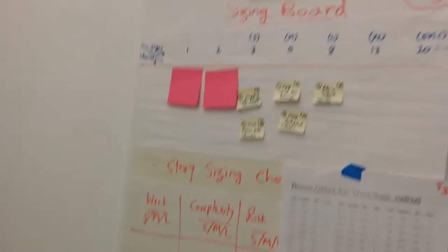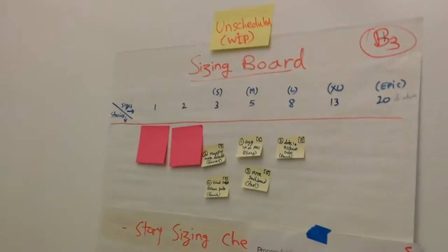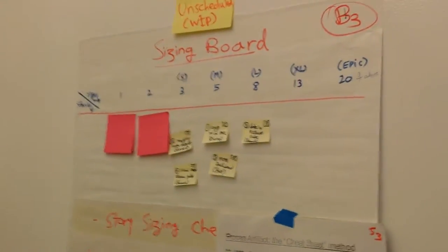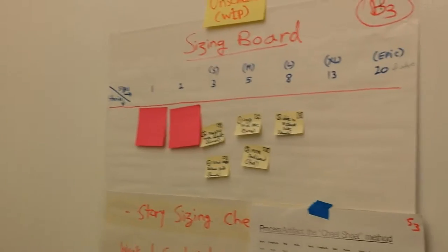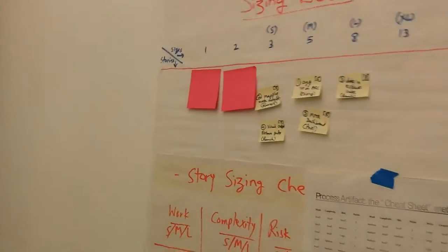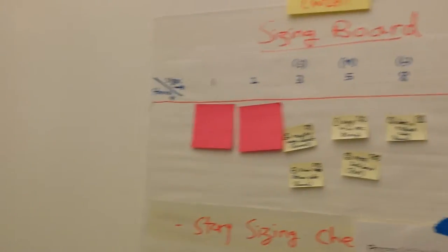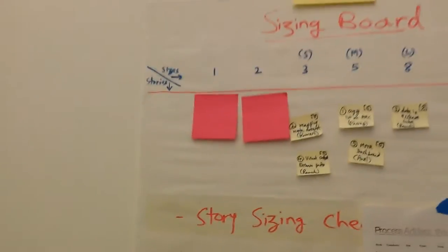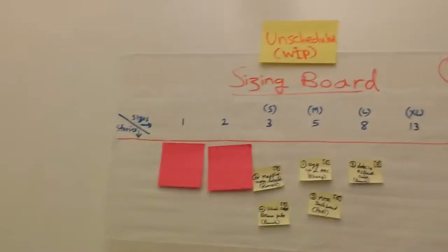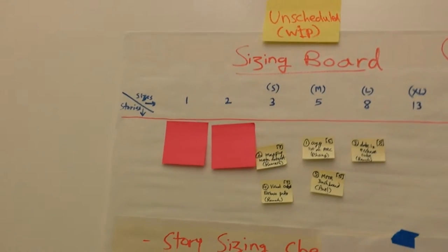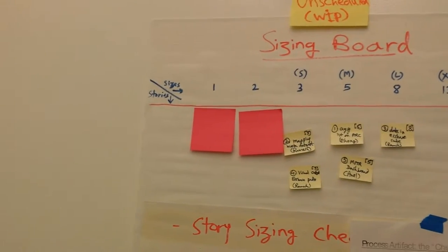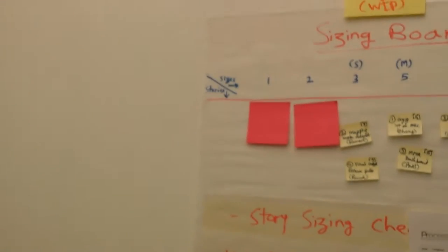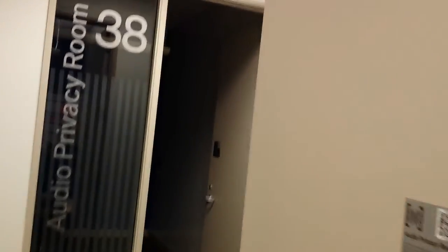Now what also happens is some of these story cards will have gives and gets. Where there are gets involved—the dependencies from upstream teams for our team—the respective team members who know the most about those gets go and talk to the dependent teams at a cadence so that they can resolve those issues.